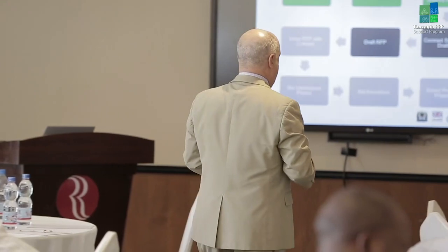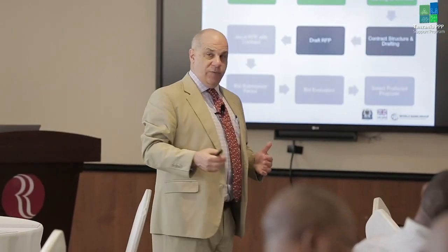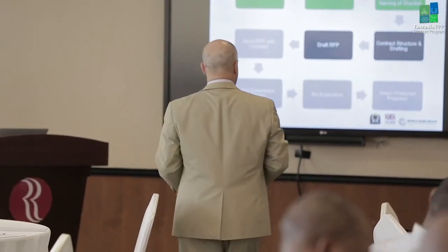And you're like, wow, look at all this money we're going to get. And let's open up the technical and see, okay, that looks fine, we don't care, and let's get the money. You want to make sure technically the project's sound. You don't want to be overly influenced by the financial proposal. So the practice is typically to examine the technical proposal first and that they're delivered separately.